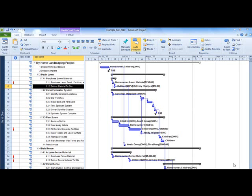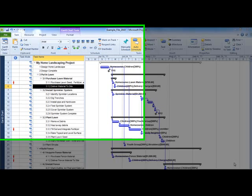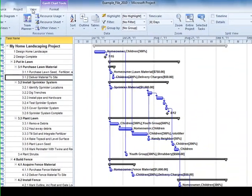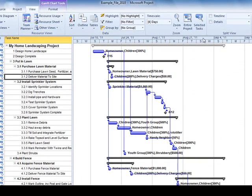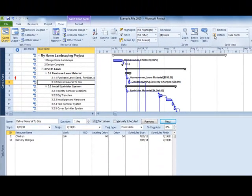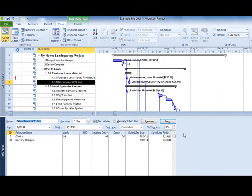An important feature for analysis is the split view. From the Gantt view, choose the View tab and select Details from the Split View command group. In the top pane, we see the Gantt chart. In the bottom pane, we see the task form.